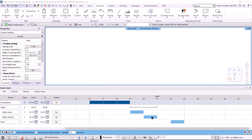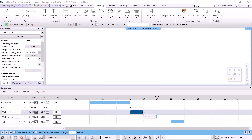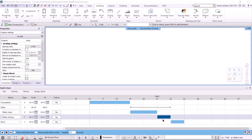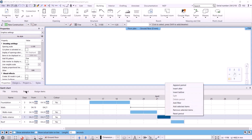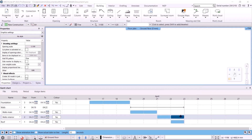We choose yes, and we can see that the activities have been pushed back. Let's see how we can add additional periods. For example, the main walls will now take 2 days. Then move the interior walls period so that they don't run in parallel. Interior walls also require multiple periods. I can insert new periods using the right mouse button with the insert after command, or by choosing it from the period menu. So the wall building will last for 4 days — the main and the interior walls together. However, I want the interior walls to last for 4 days in this case, so I set it manually.